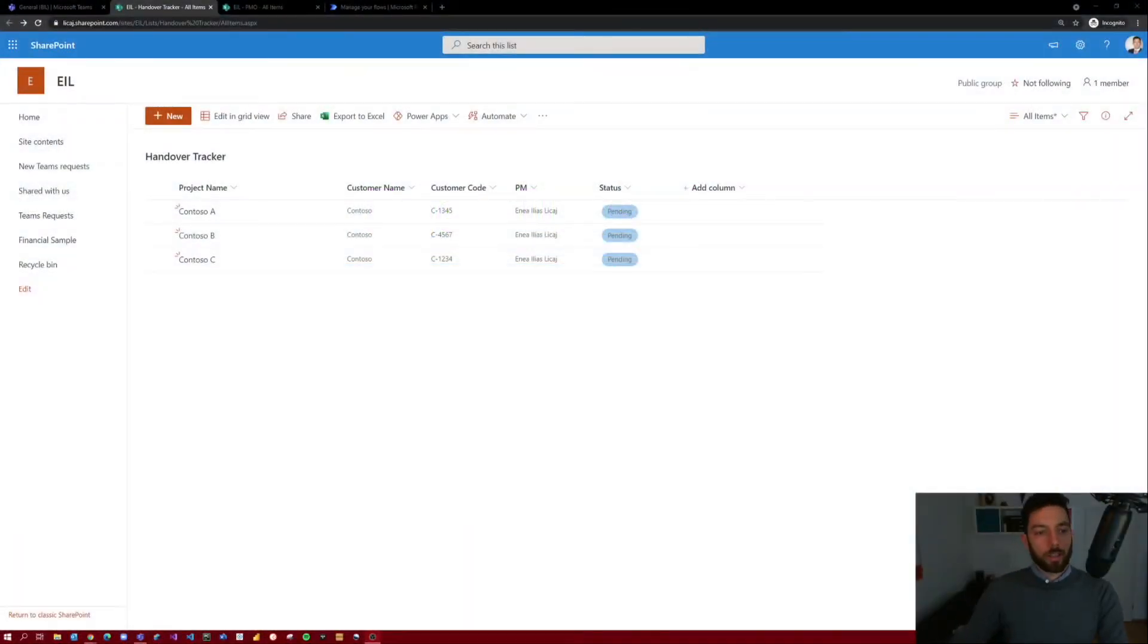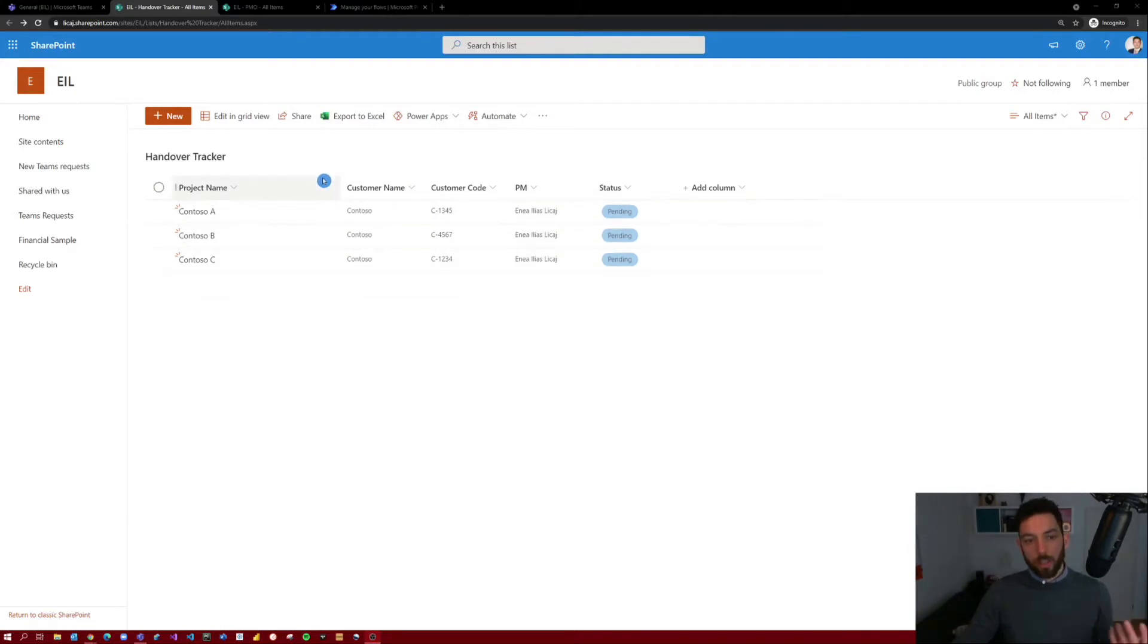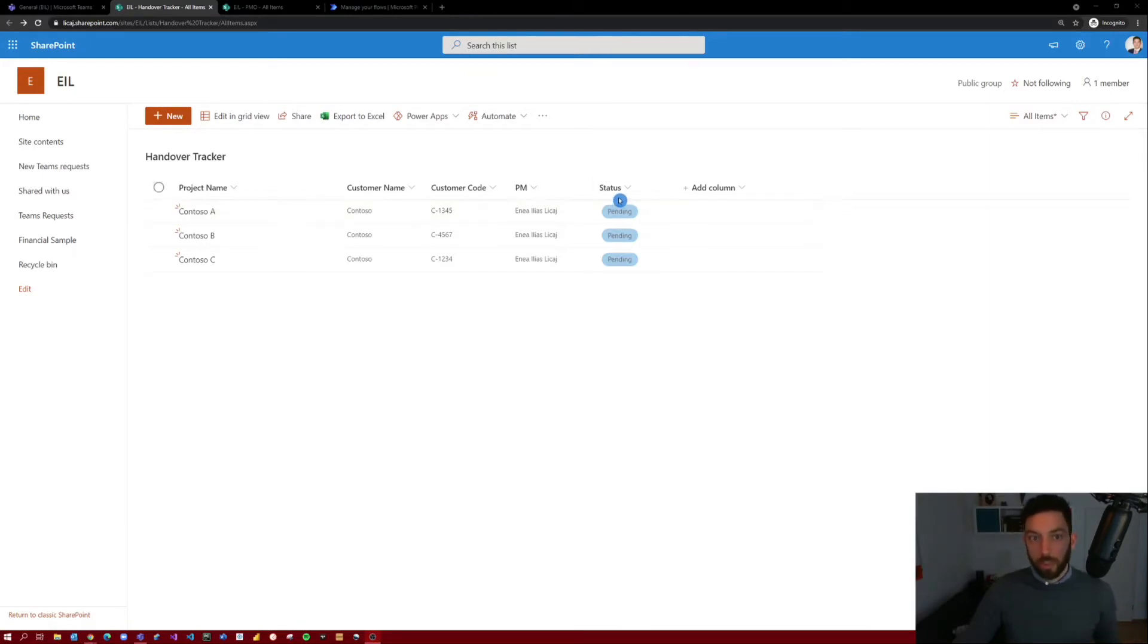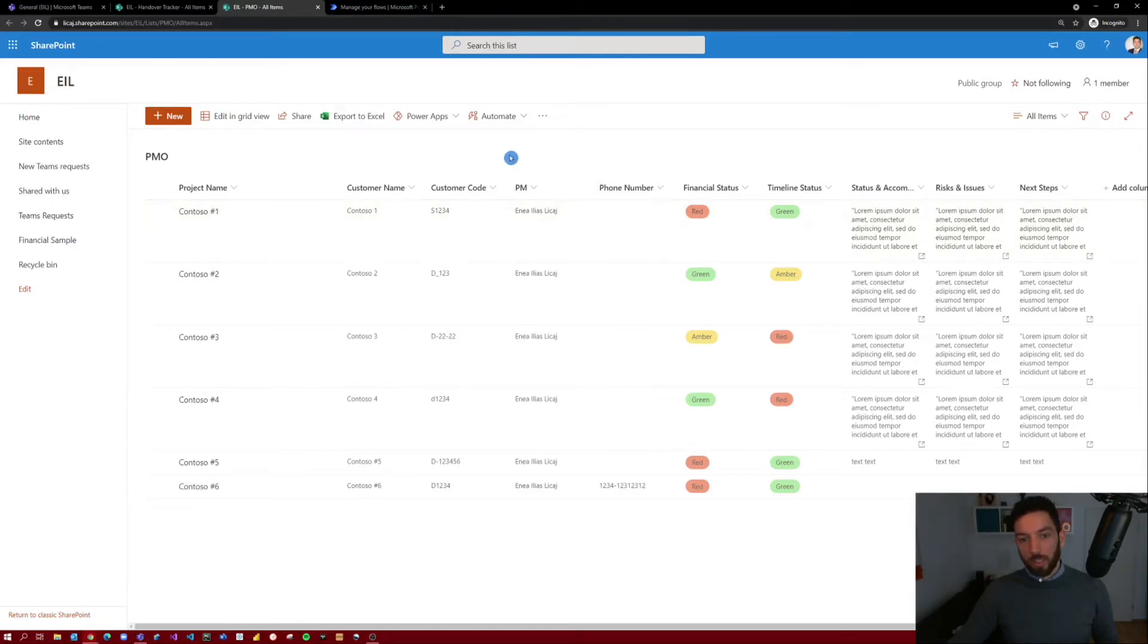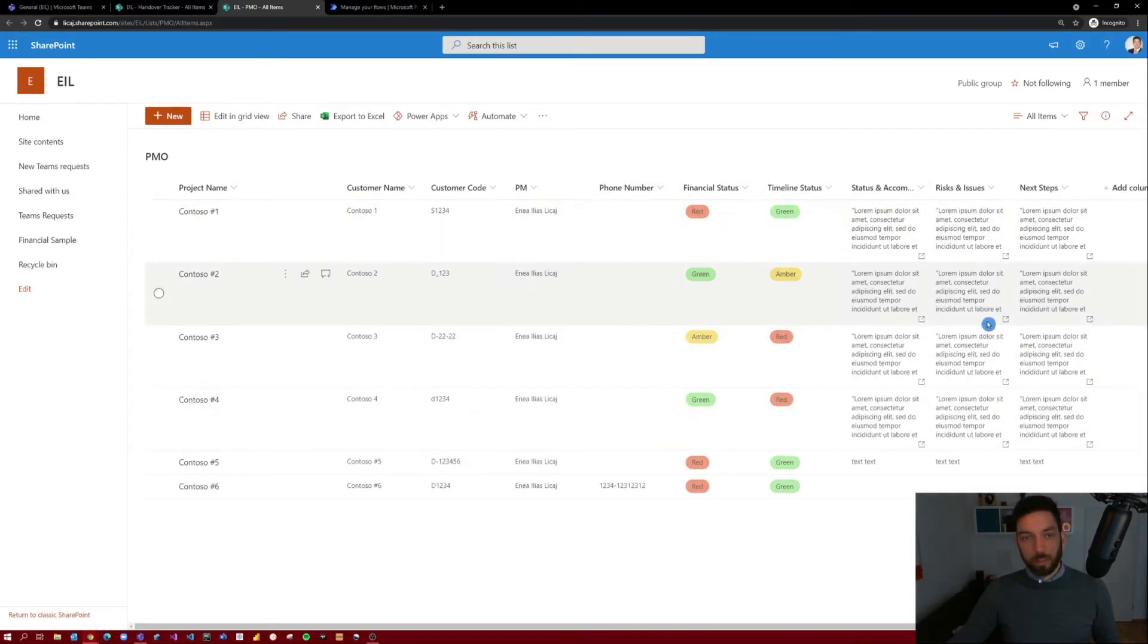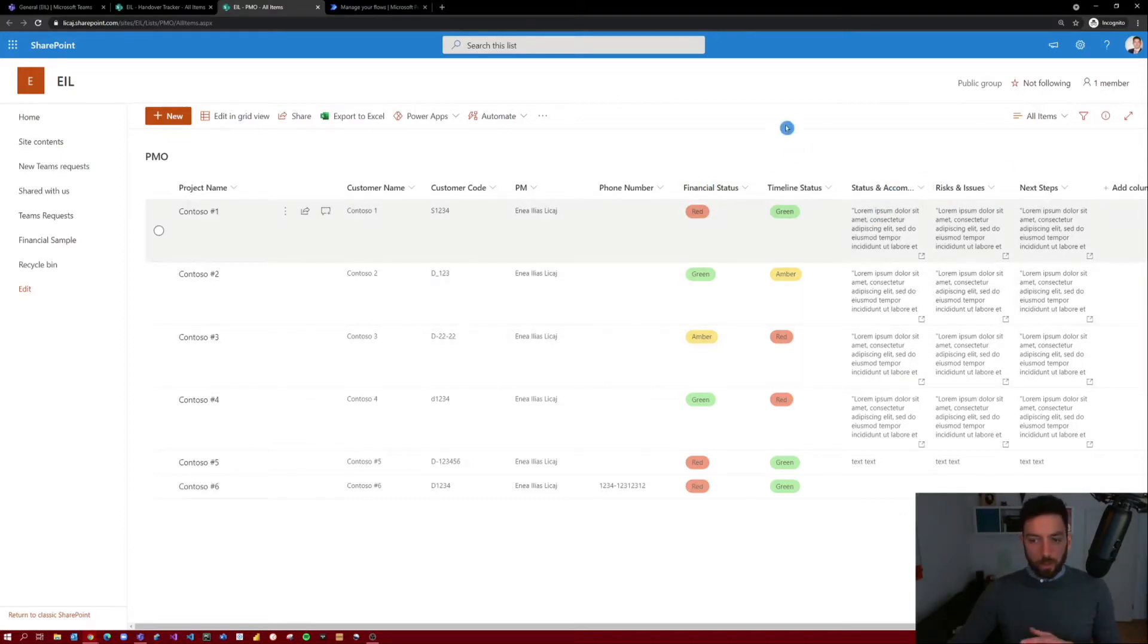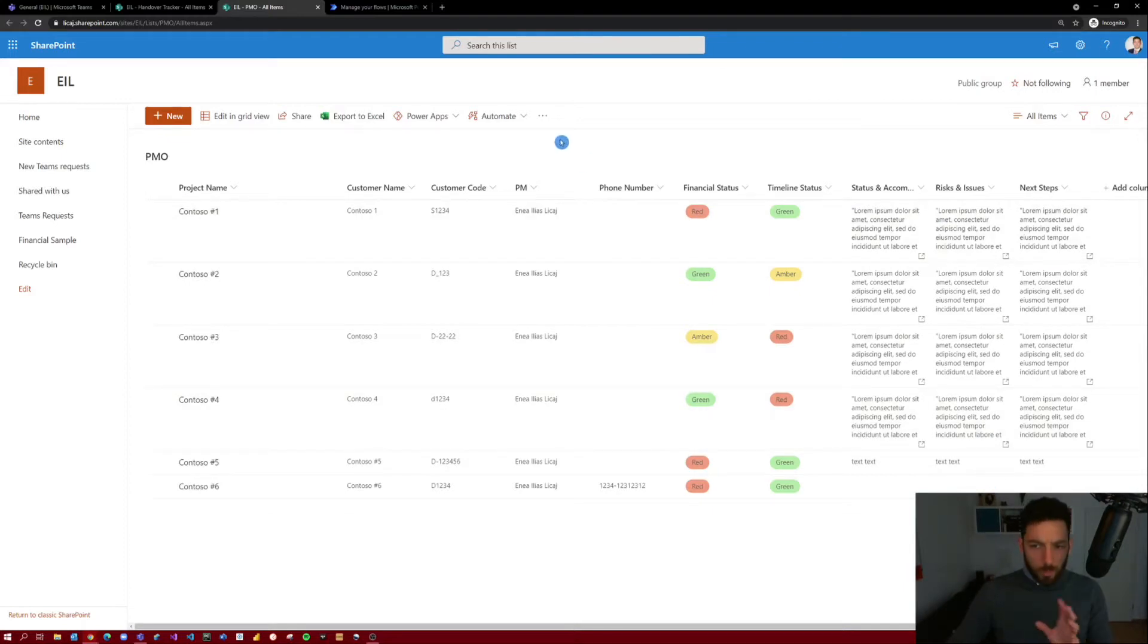So here we are back in our Handover Tracker SharePoint list, where the projects first come in from the sales team maybe or whatever, and they are listed here. When they find the PM who has the availability to take over this project, then the status turns to approved and the PM gets notified and so on and so forth. Then the project will be copied across in the PMO, where it is managed by the project manager. This project gets this information from the Handover Tracker and then the rest of the information will be filled out by the project manager. Imagine this as an example. You can have whatever you need in your case for the rest of the columns. But that's also not the point. The point is how you bring the data from A to B.